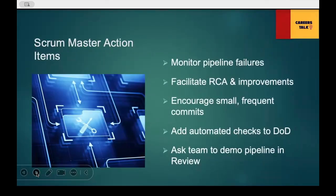What are the Scrum Master's action items? As a Scrum Master, our responsibility is to monitor the pipeline health daily, facilitate root cause analysis, and drive improvement discussions. Encourage small, frequent commits to reduce risk. Ensure that the Definition of Done explicitly includes automated checks. During sprint reviews, request the team to demo the pipeline as part of the working increment. This makes you a DevOps-aware Scrum Master — a strong skill in the industry today.